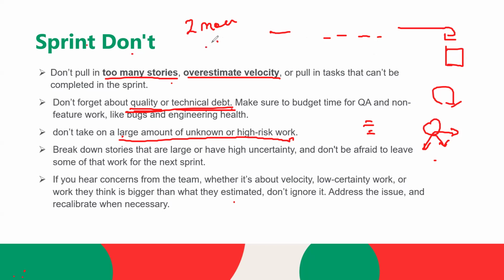Then the Scrum Master or project manager will move tasks from the project backlog to the sprint backlog accordingly. But if you haven't informed because you are afraid of what the response will be, and you take leave unexpectedly, this will impact the sprint goal. If you inform in advance, then at sprint planning, based on capacity, there will be a priority of tasks. If enough resources are not there, they have to deprioritize tasks. There is no other solution, but that is much better than taking leave unexpectedly.